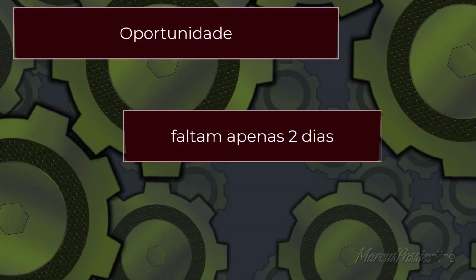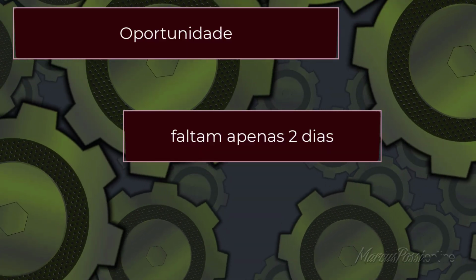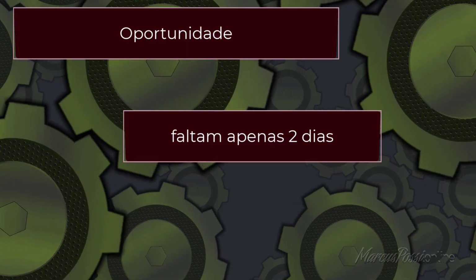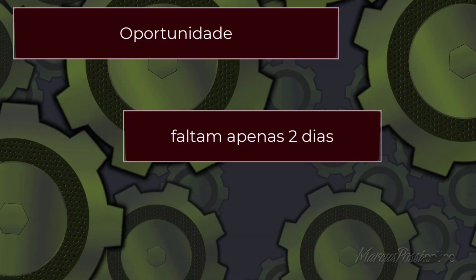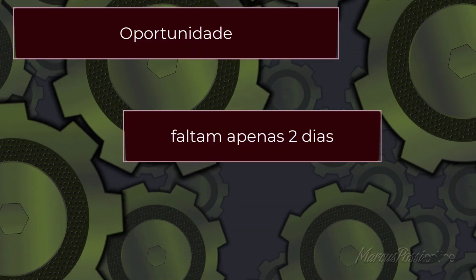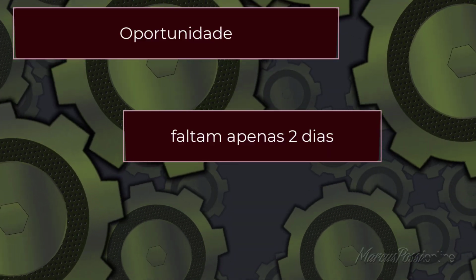Okay. Third, and this is maybe the most critical part, define the relationships. This isn't just simple finish-to-start links. It's mastering the complex dependencies, start-to-start, finish-to-finish, plus lags and leads to model how work actually flows. So building a truly logical sequence, not just connecting boxes. Exactly. And avoiding artificial logic that breaks down later.